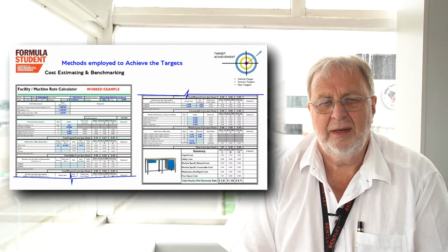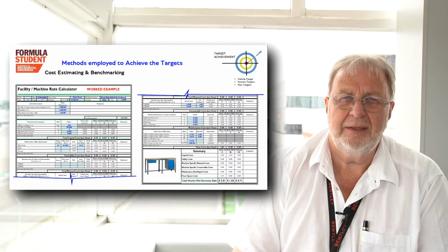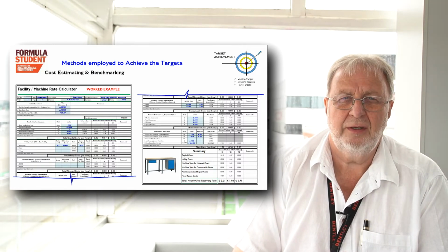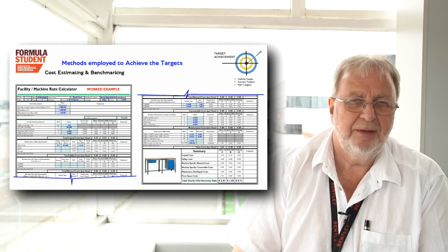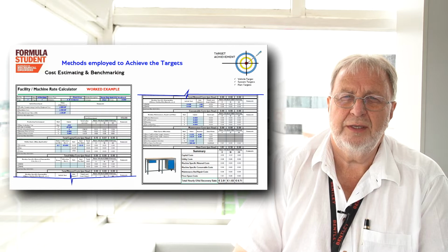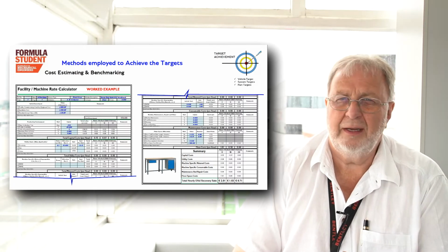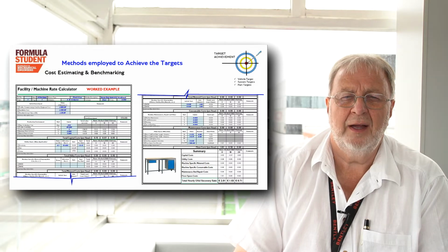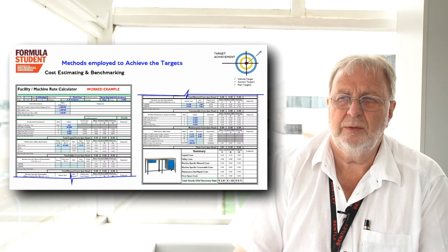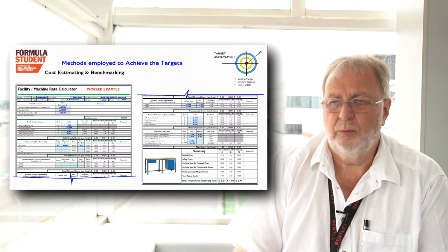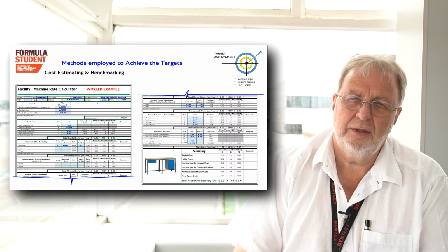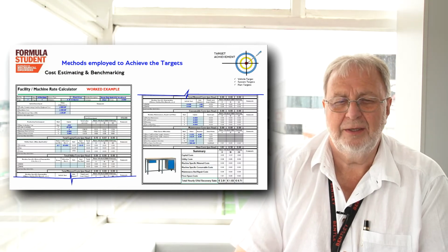When you're looking at the value engineering activities, don't leave it too late in the program. It needs to happen right at the very beginning. The window of opportunity to save on cost or to avoid cost is before you make any attempt to cut metal or to waste too much time on your staff resource, going down a path that ultimately will lead you to a high cost item or system or subsystem. So use the opportunity right at the beginning when you're working at concepts, when you're playing with ideas. What else can we do? How can we achieve this at a better value, at a lower cost, still achieving the performance you're looking for? And it can be done.